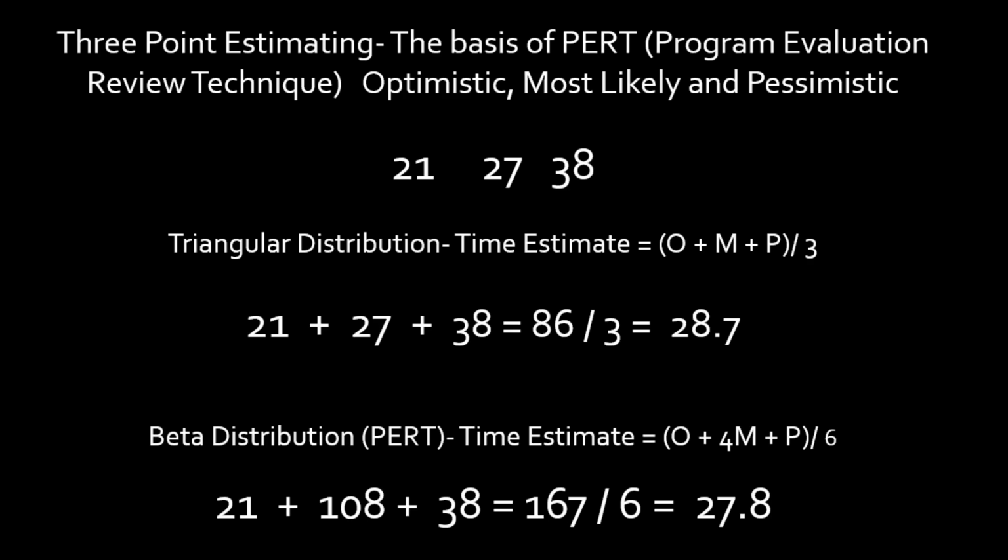In doing so, I'm making a nice tight schedule. A project should go as long as it needs to, no less, no longer. So I don't want an 8-month project if I can do it in 6, right? PERT helps me out with my 3-point estimating. This works for estimates of time. It also works for estimates of costs, when I talk about optimistic, most likely, and pessimistic, and weighting the formula with 4 in the middle. This is not rocket science, folks. PERT is this simple, but you will see this on the exam.